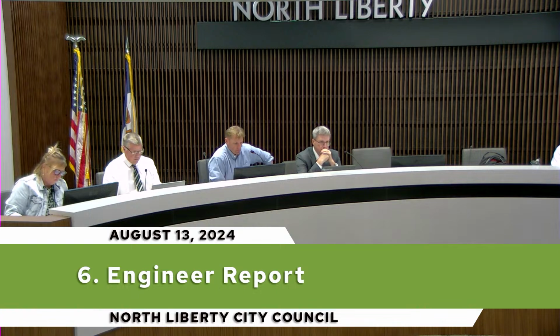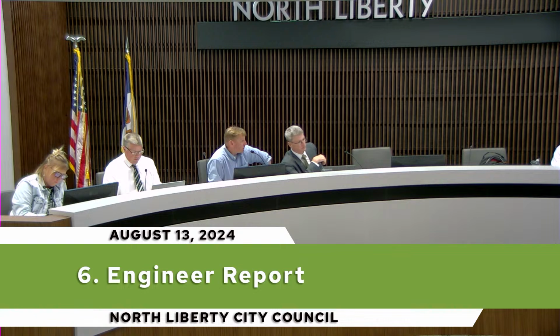We've still got quite a few projects underway in construction. Centennial Park, obviously the big one. They're doing some grading work and doing a lot of shop drawings, review of details and materials, but foundation work will be starting shortly after the grading around the building gets rough graded.